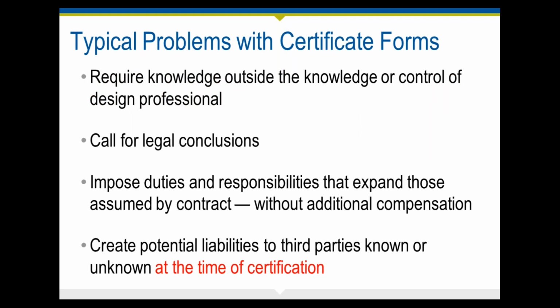That is a challenge because you may be being asked to certify things that you don't know about or have control over. And it may call for legal conclusions that you are not able to make, because that's a legal conclusion that should be provided by an attorney. And from a risk standpoint, it may impose a duty and responsibility that expands what you have assumed by contract. And for that expansion, you may not be getting an additional payment. And so it may not make sense for you to provide that certification because it's not something you've assumed responsibility for in your scope of services, and you're not being paid to assume that risk.